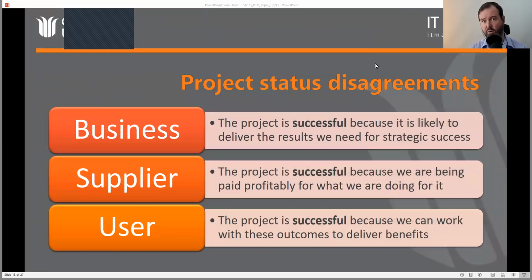It doesn't mean they're wrong. It doesn't mean that they're not something we should respond to. We may need to respond to that, and that may well be a reason to enter recovery mode. But that means we've got to explore it in the context of everything else. So remember the definition we gave earlier about how to know whether or not a project should be considered a candidate for recovery. It's whether we think it's outside of tolerances, bad enough and for long enough that it's threatening the business case, and we don't think we can fix it with the current methods.